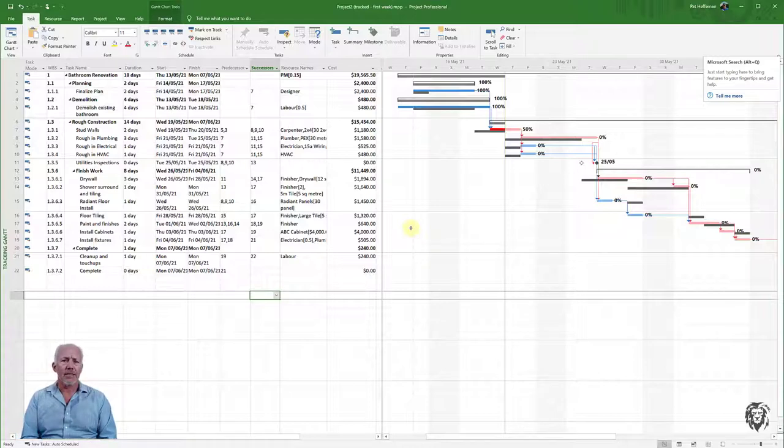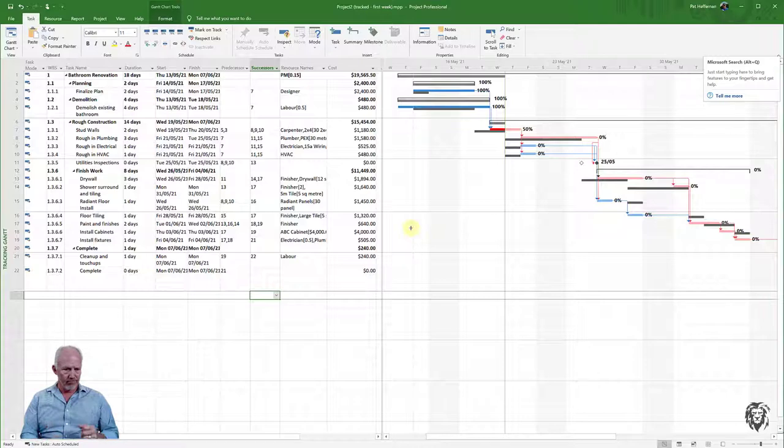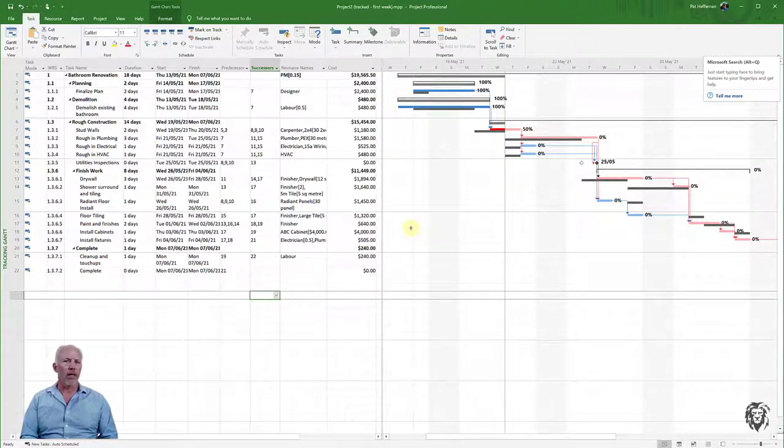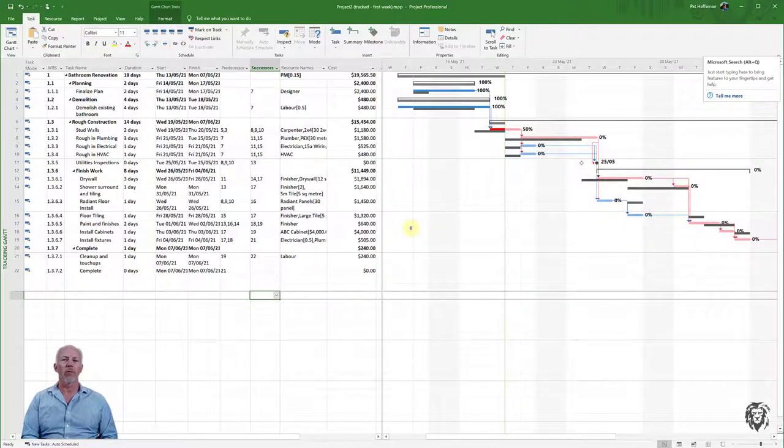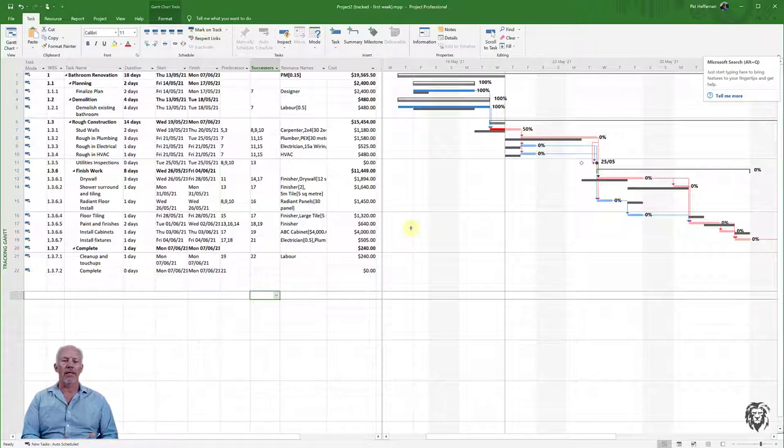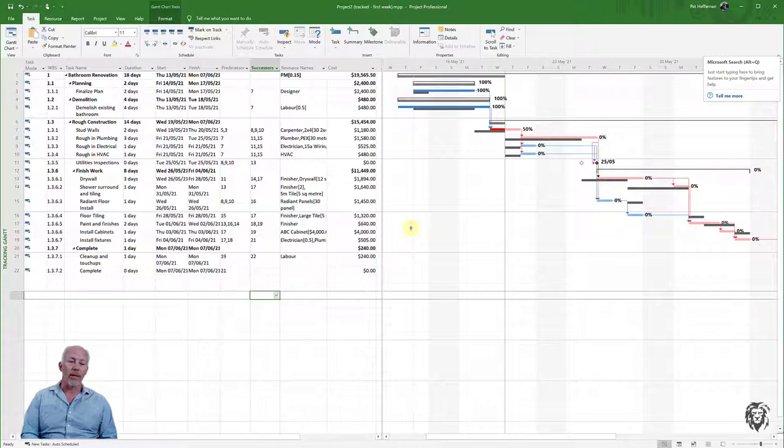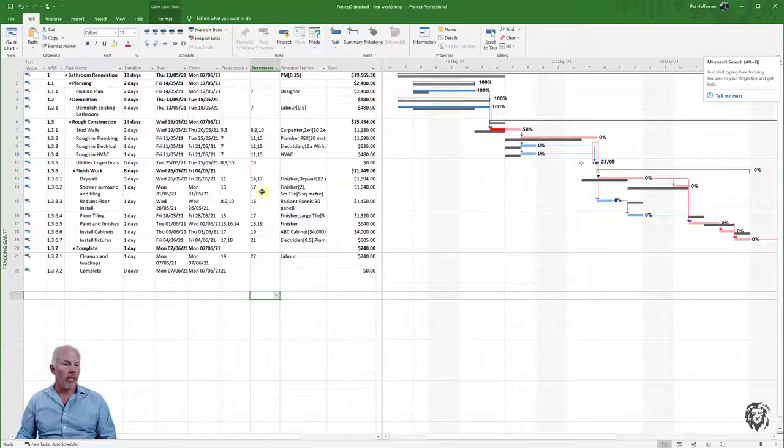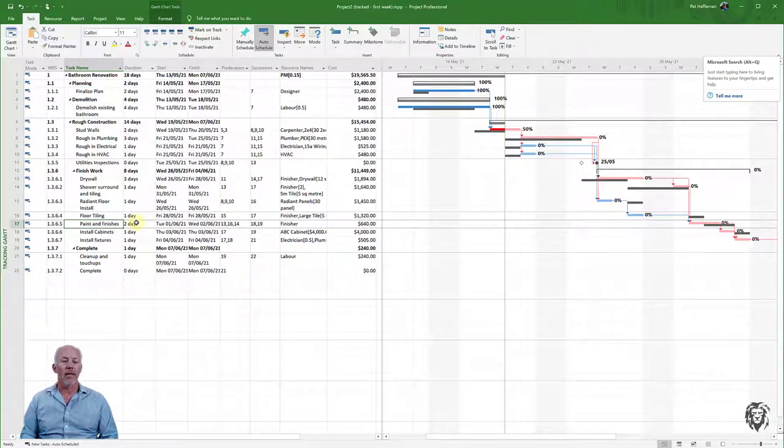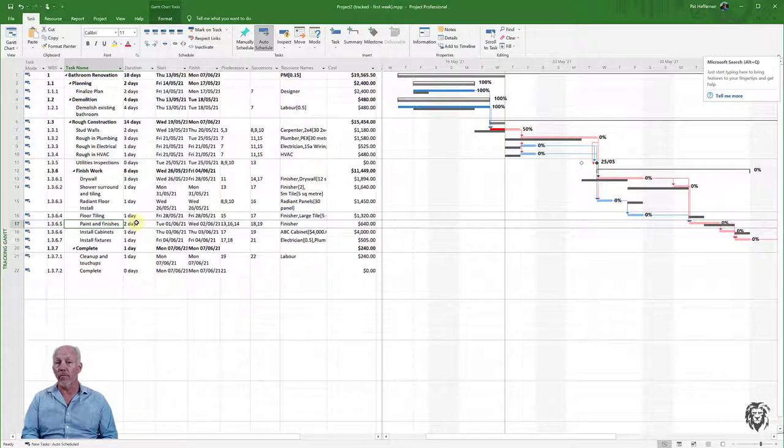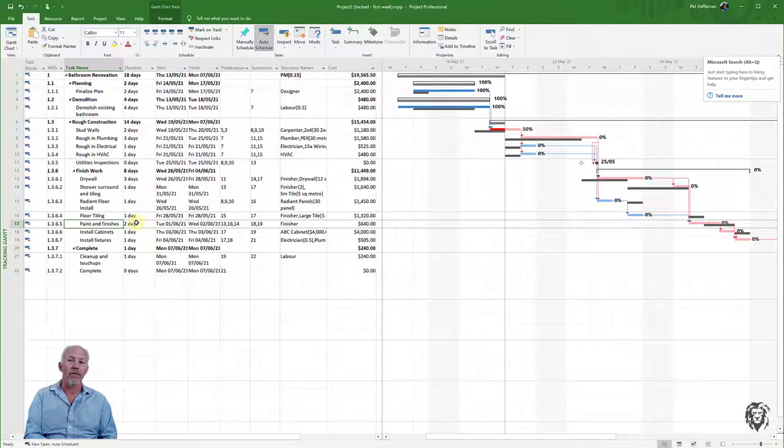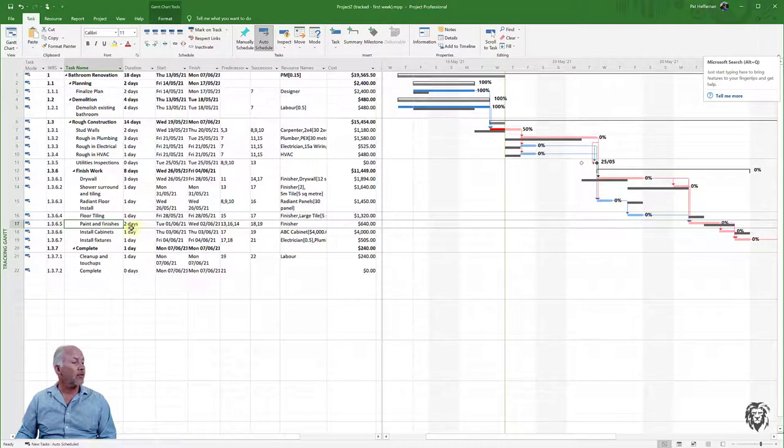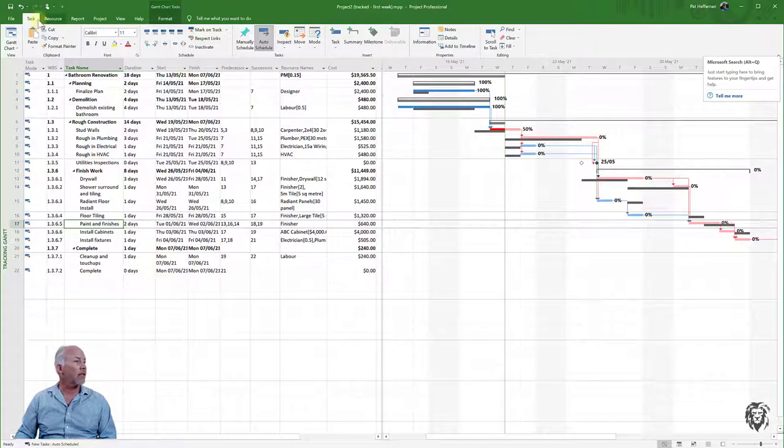The last method is working overtime. We've put overtime rates in the Resource Sheet. Sometimes you need to find time, and authorizing overtime—whether a weekend or longer days—lets you shorten your project. To demonstrate, let's look at the paint finishes task, which is two days. We want it down to a day and a half, so we'll authorize four hours of overtime.